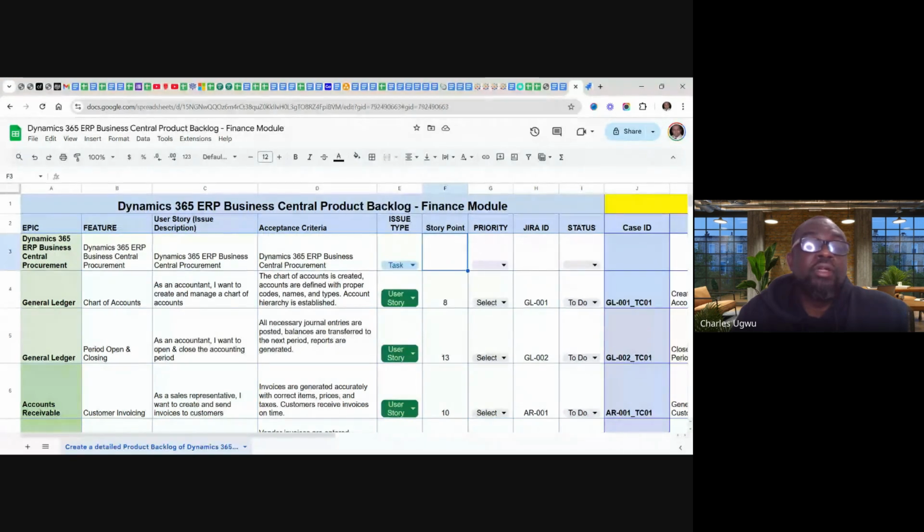So that's why, when I said that product backlog is not only user stories, it can be over time. When we start configuring this, we are going to be noticing some bugs. We need to capture those bugs because it's still work. We need to do some work in order to fix those bugs. When we are capturing those bugs, we're going to call them bugs as well.